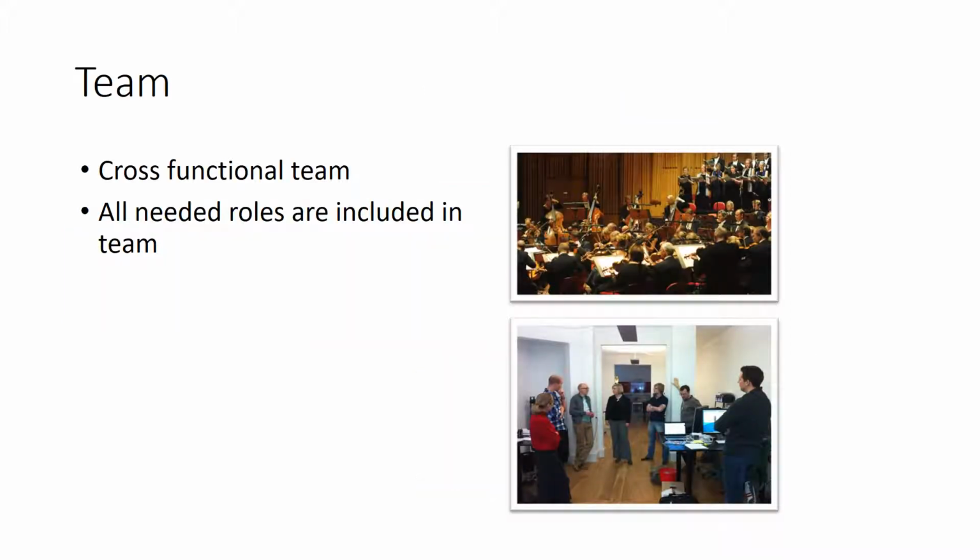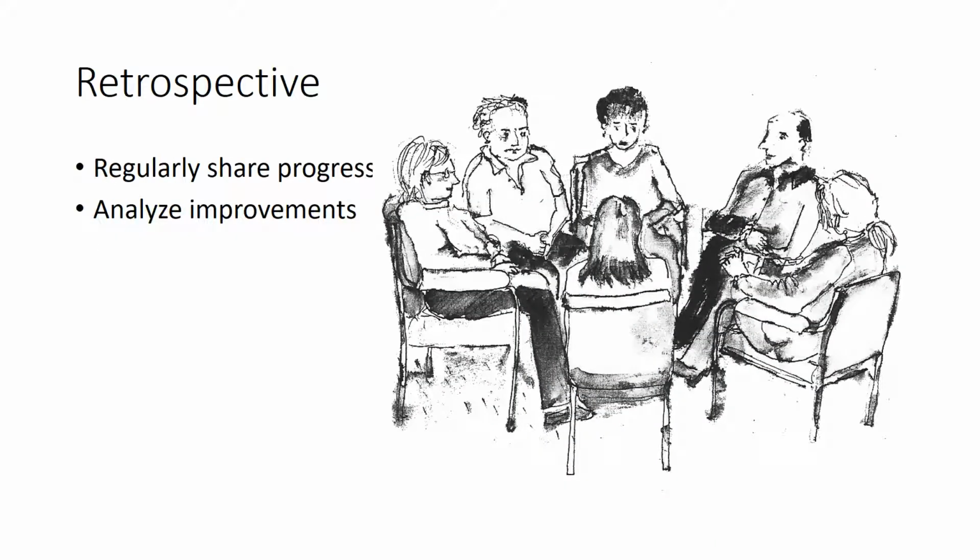Talking about the team in Agile, we are talking about a cross-functional team. It means that there is no team of only designers or developers or some specific title of people. Different people with different competencies come together and work as a team. Usually small teams are preferred for agile projects, like 5 or 7 people, not more, and they complement each other to deliver the best results.